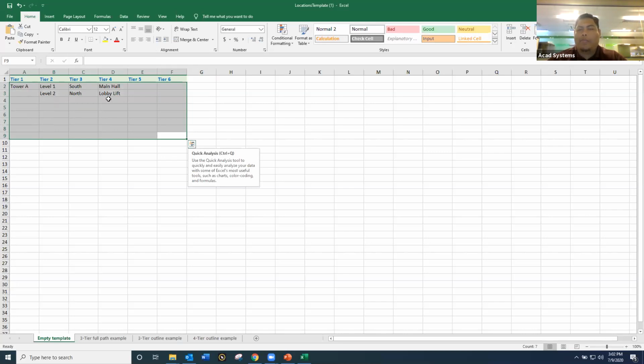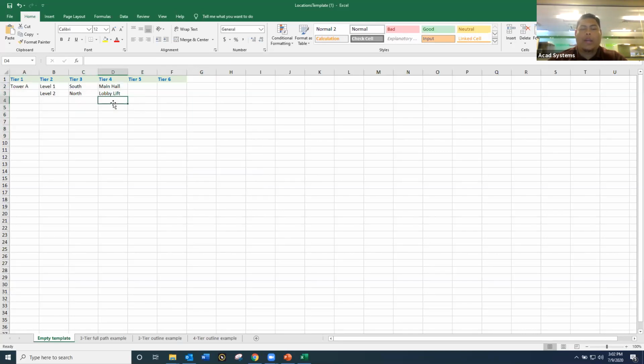When I saw accounts set up by our customers, most of them were putting in the wrong locations, and that would give them issues and problems, because once you need this location to assign issues, to create RFIs, to create submittals, all you need to do is assign the right locations into this.